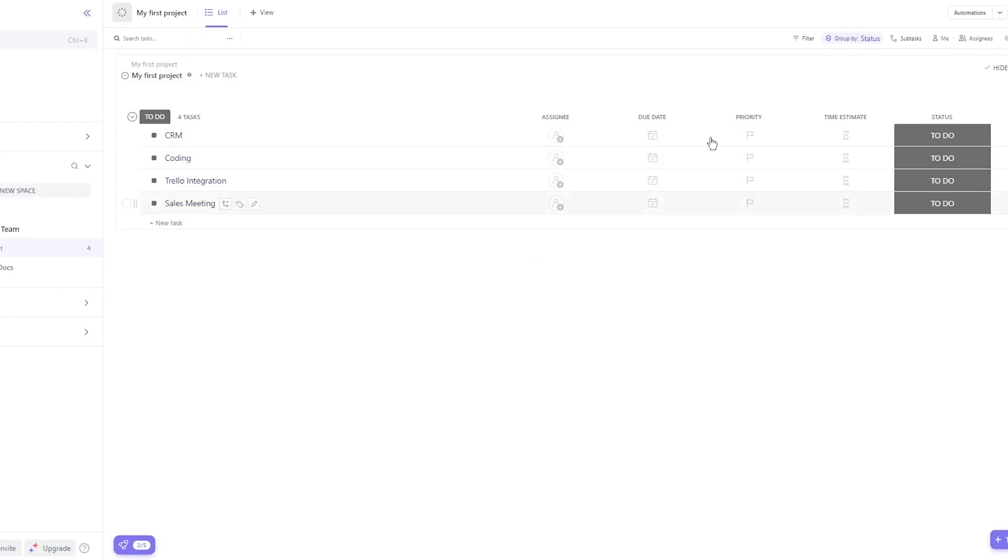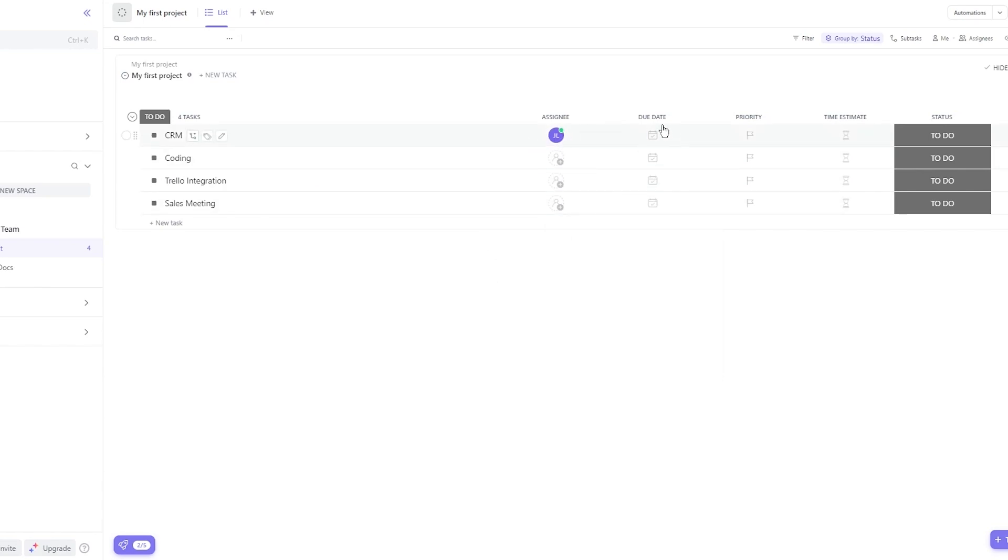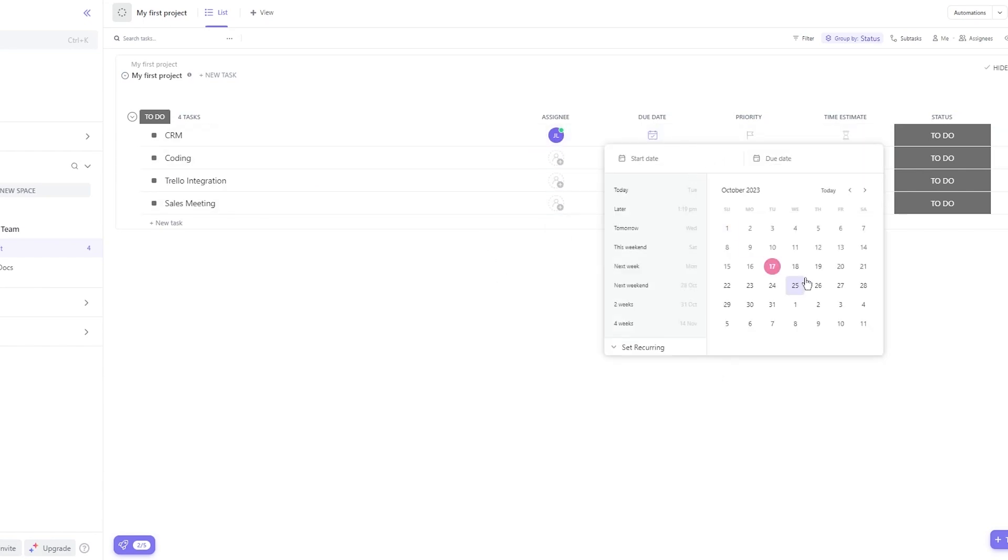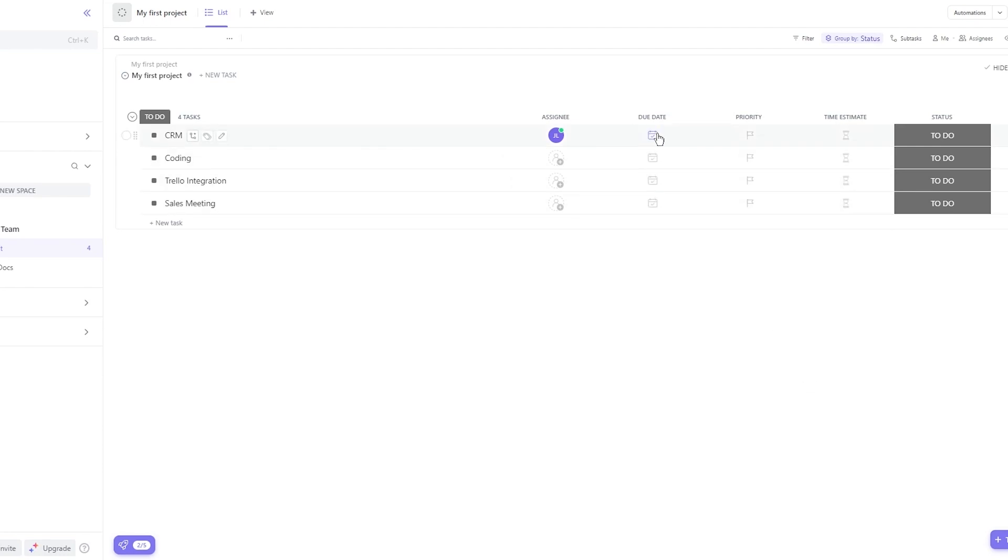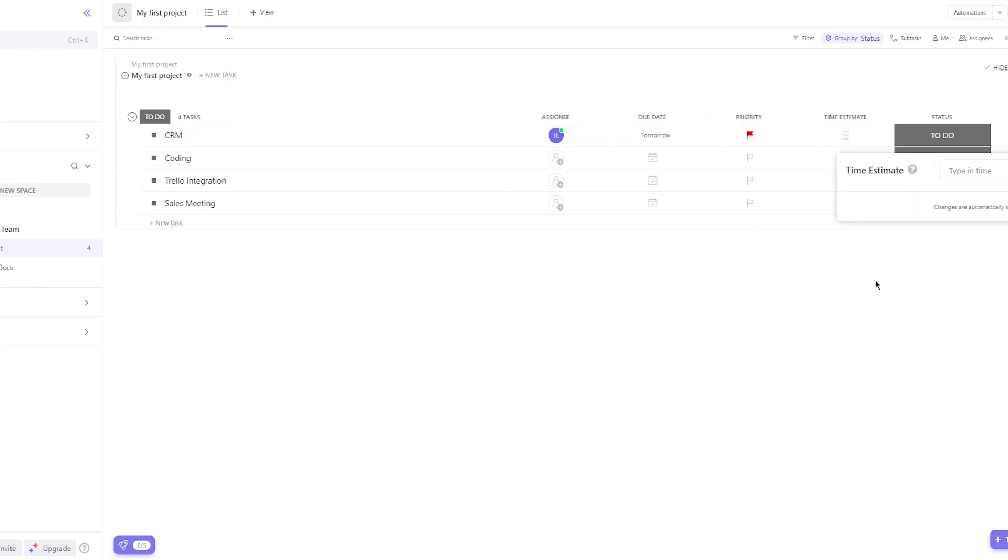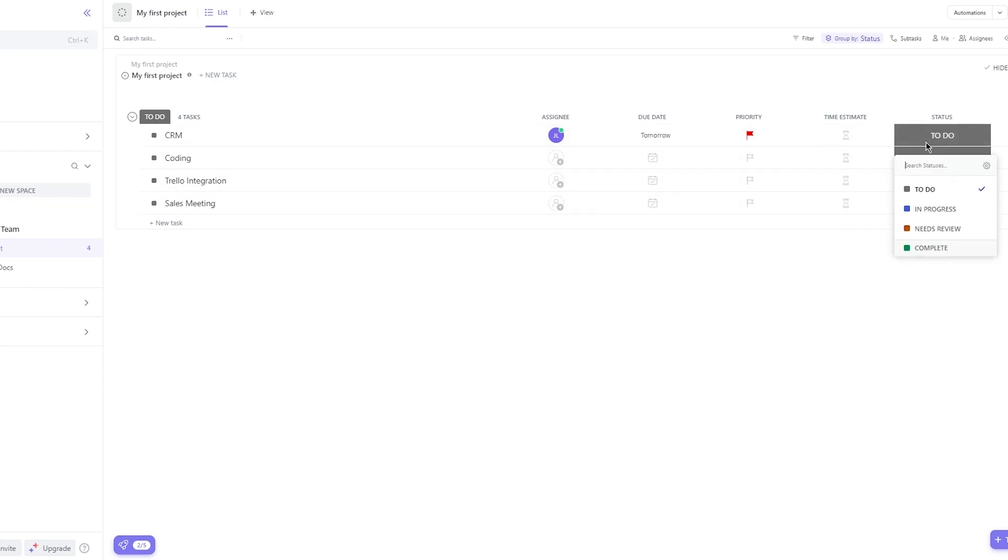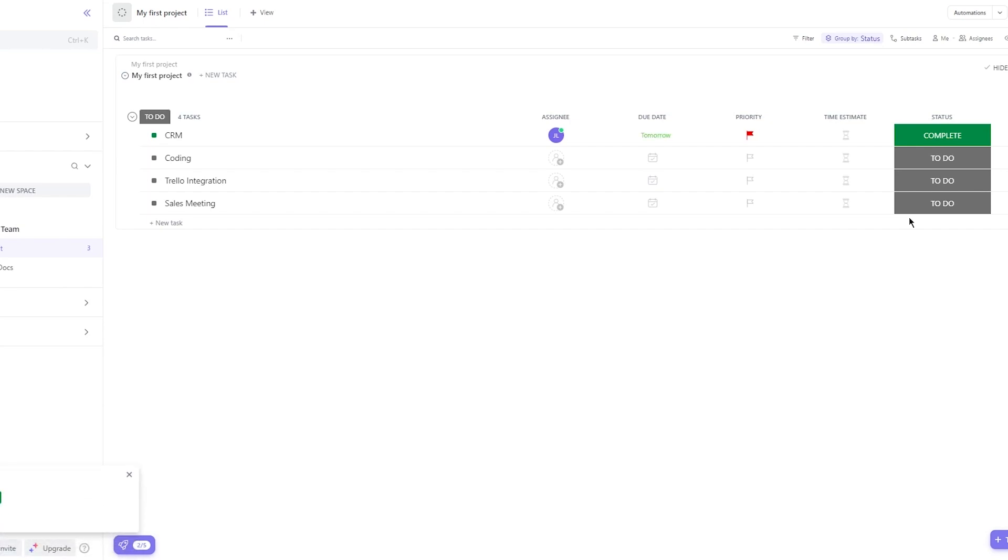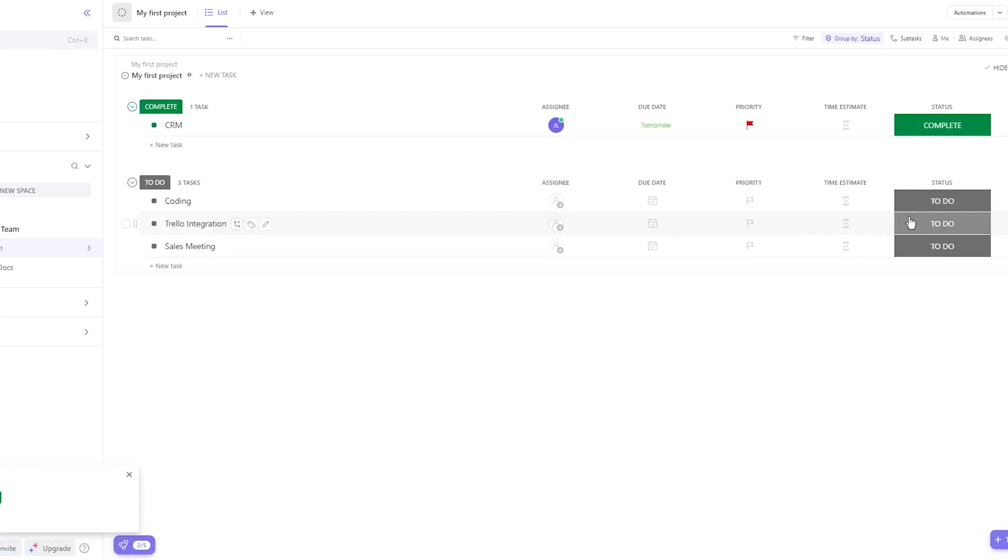Now then moving on, once we have done that, there's different things over here as well. You can assign certain people certain things. So let's say I'm going to assign this to this person. You can give them a due date as well. That hey, if you don't have it to me by the 18th, yeah, we're done. So you get the point, you get the due date. Then there's priorities. You can keep it urgent, high, low, normal, etc. Then there's time estimates, that I need this in 45 hours, etc. Then there's status. Status is also a pretty important place because to do, in progress, needs review - this tells how much work has been done, how much work is being done, etc.